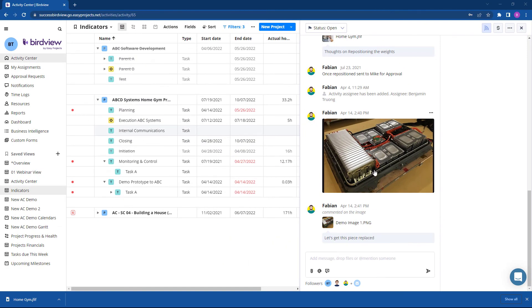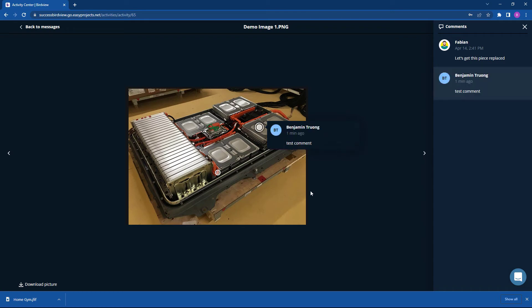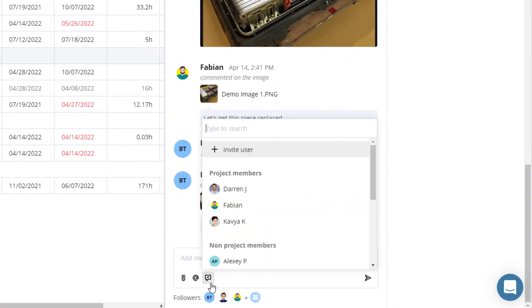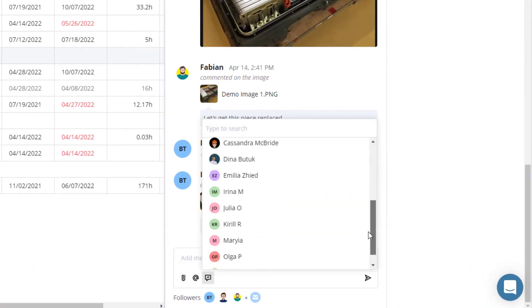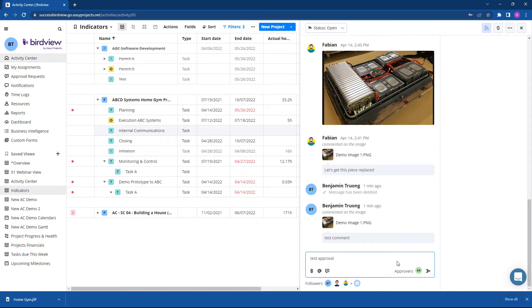BirdView also supports image annotations. Click on an image, select a specific area, and annotate as required. Anyone with permission to edit an assigned task or project has the ability to be an approver. This allows the contributor to know that the work they have done is approved or rejected and needs to be reworked before it can advance. This type of approval is also helpful when working directly with clients.